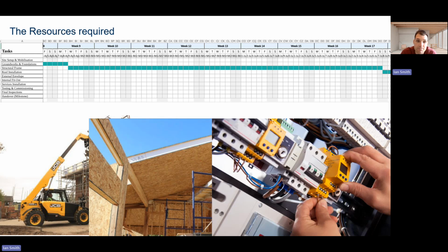to the correct standard. After these have been completed, the third resource is our structural erection labour and lifting plant, including things like we can see here, our ladders, mupes, things of that nature. So these are required after the substructure has been completed and has been appropriately cured. And it's when the superstructure phase is begun that these are required.